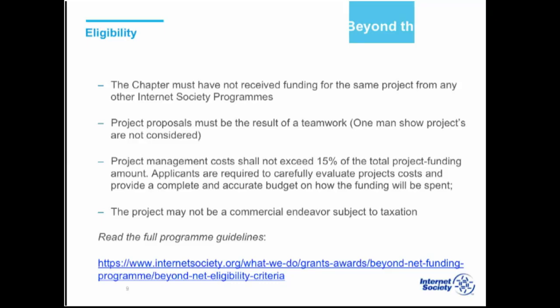And then, regarding the project management costs, they should not exceed 15% of the total project funding. The reason we have this limit is that we don't want all the grant funding to go into labor costs, administration costs for the project, and so on.